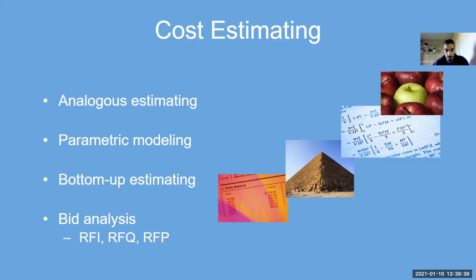You're basically shopping around, going to 4 different distributors of Zoom and asking them, hey, give me quotations. If you were to give us 100 licenses, what would it cost? So it's an RFQ, it's like an invoice. They give you the unit cost multiplied by the quantity. The RFI is more technical. The RFP is both technical and cost information in it. So those are the 4 common methods to kind of come up with your estimate.